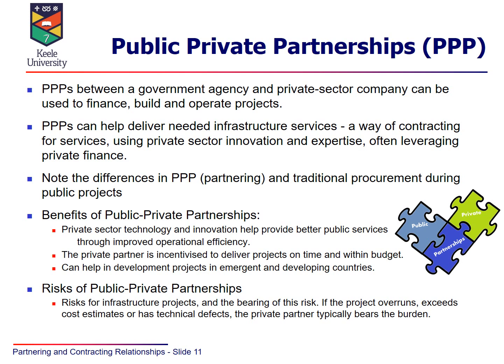Some of the risks of public-private partnerships are to do with the bearing of this risk. Typically, if the project overruns or exceeds cost estimates or has some technical difficulties, it's often the private partner who bears that burden. And we can see that again with the Carillion experience. No matter what we think about the background and what happened there, clearly the company went out of business. The government will still continue on.